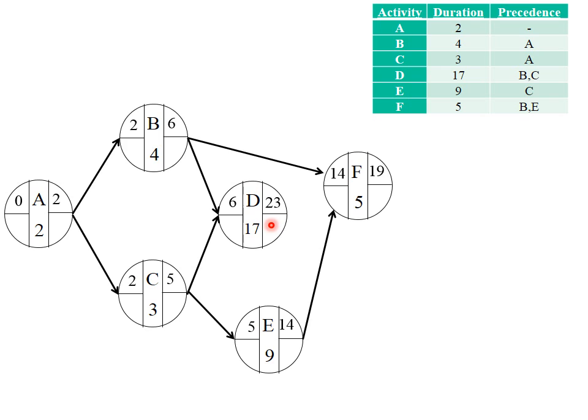To avoid this confusion, where you have more than 2 activities that feel like terminating activities, we use a dummy activity, which ties all the loose ends together. We want to have just one terminating activity. Okay, so let's do a terminating activity.